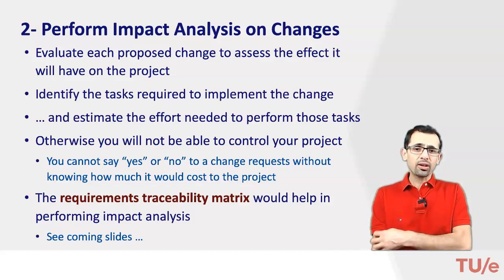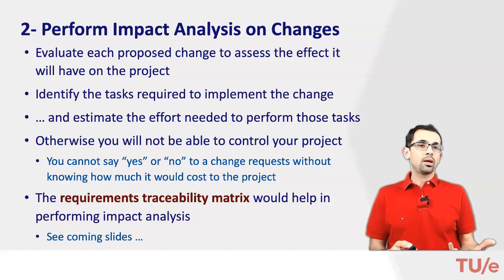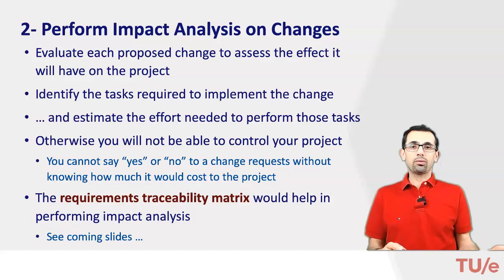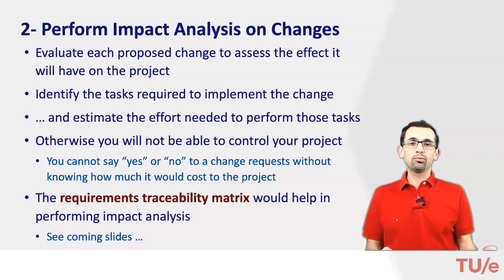So you identify the tasks required to implement the change and estimate the effort needed to perform those tasks. Otherwise, you will not be able to control your project. You can't just say yes or no to a change request without knowing how much it would cost you, how much effort it would involve.